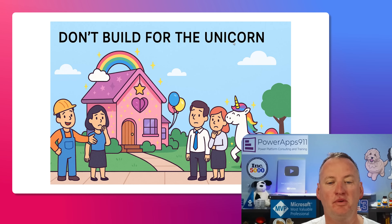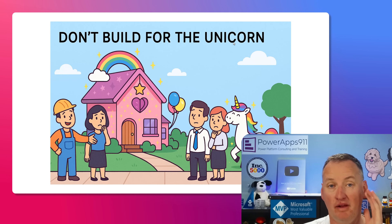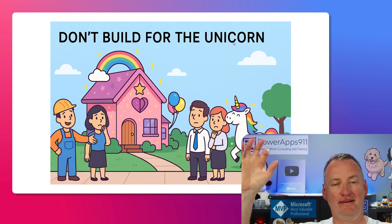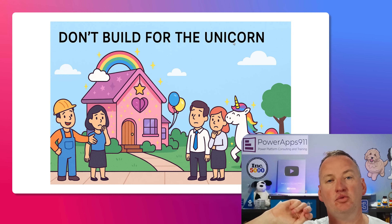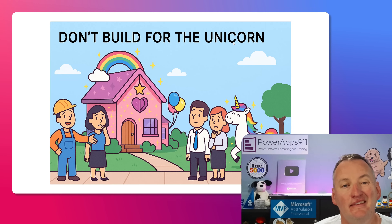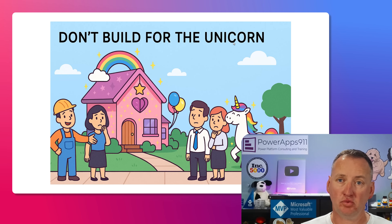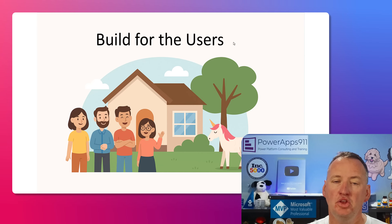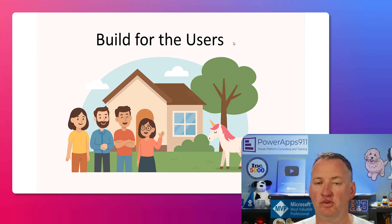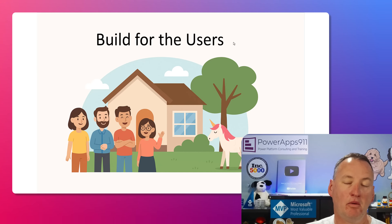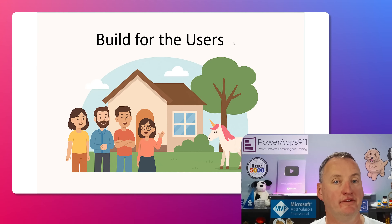So often we run into people who, when planning out their apps, have all the good ideas of things they should build the app for, but then bad ideas sneak in there. They start thinking about those one-off crazy scenarios — the unicorns of the world — and then they start adding requirements for that, which might double or triple the complexity of their app. You want to build for the people that are actually going to use your app day in, day out.